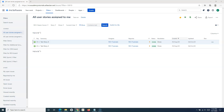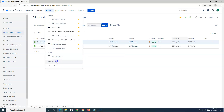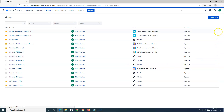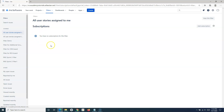The next important feature is filter subscriptions. To manage subscriptions, go to the filter details and you'll find a subscription option, or go to View All Filters, click the three ellipses on the desired filter, and select Manage Subscriptions. A subscription means that if you or a list of people subscribe to a particular filter, you will get notified about those search results at a set interval of your choosing.